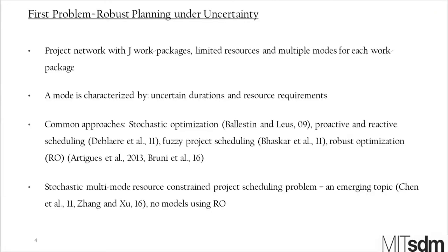So the first problem is about robust project planning. We view the model as a network of work packages with limited resources and multiple modes for each work package. What is a mode? A mode is an alternative to perform the work package. For example,